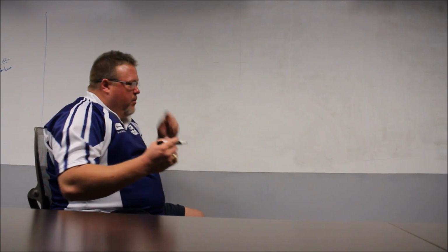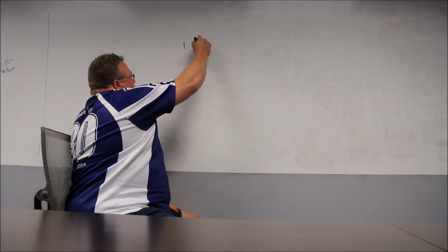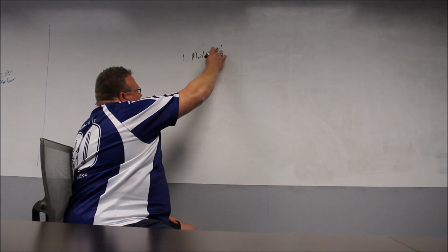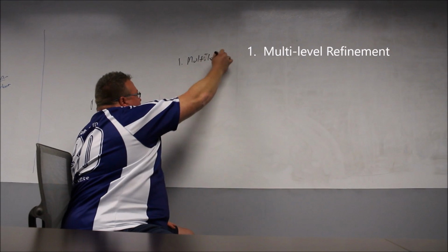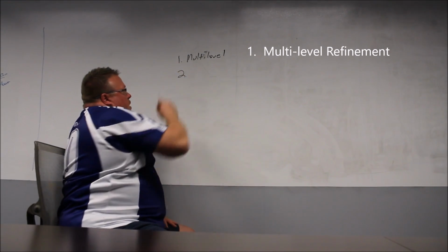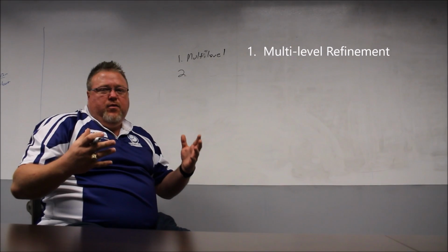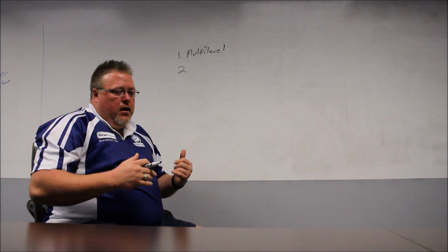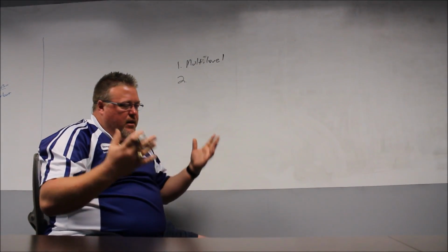So what we're going to talk about today is how you can create this sort of multi-level refinement activities for your teams and allow the product owner to be able to still service up to 9 teams. So the first thing you have to remember is that you need some sort of multi-level process. It's not a one-size-fits-all level refinement. So for instance, let's say you've got a 2-week sprint and you might have, say, 3 refinement sessions in that 2 weeks for any given set of teams, up to 9 teams.